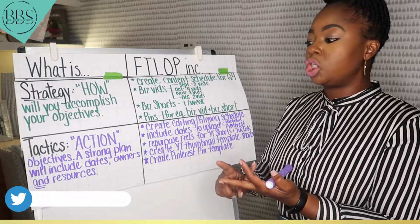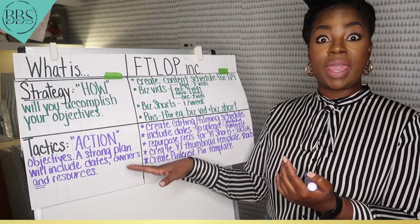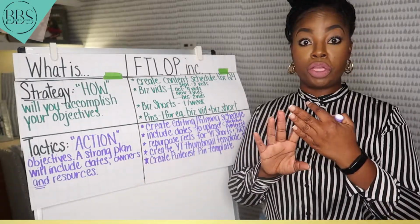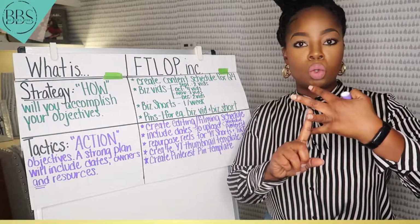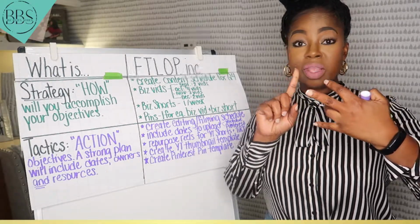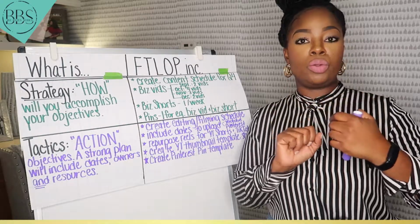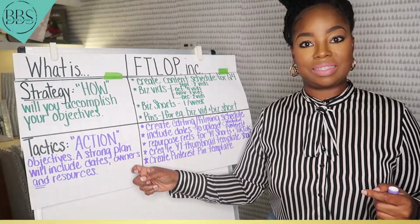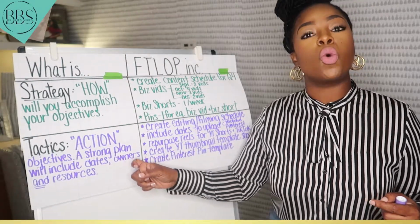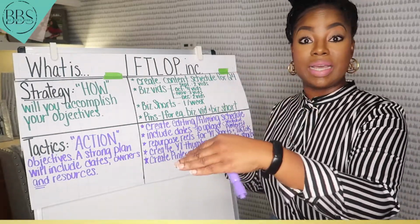So I can't just put resources like, okay, I want to create video A by next week. Here are the resources: Nicole to film, John Doe for editing, and my graphic designer Jane Doe is going to do the thumbnail. Who is owning that task? Because the owner is going to make sure that all of the resources are going to meet that deadline.